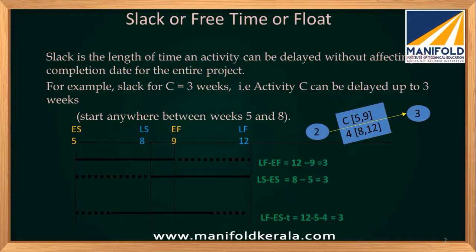But if I start by 10 o'clock, I can only finish by 3 o'clock, right? And if I start late, even at 11 o'clock, I can finish by 4. The maximum delay is starting at 12 o'clock, so that I can finish by 5 o'clock. So this 3 hours is there, but whether I start early or late dictates which hours I will be free, right?